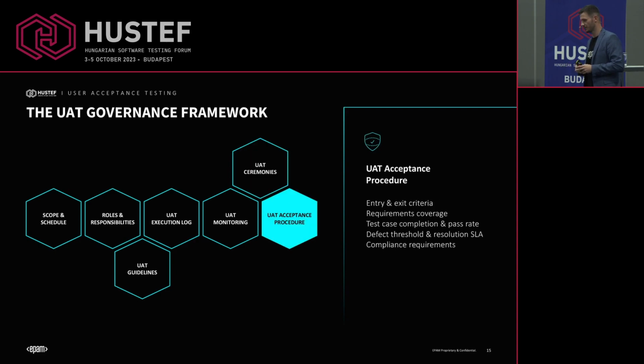And the last point is about the UAT acceptance procedure, which I talked about partially. Here we need to be able to know when we are ready for the UAT. So of course, a set of activities should be listed, like environment identified and deployed, configuration done, and access verified by the client, and so on. So that's available for us and agreed with everyone. And the same goes for the acceptance part, where we really verify that all the features have been verified from different points of view.